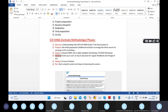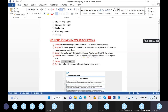Later the project will move to the Realize phase. The Realize phase is where we configure and test the project on a day-to-day basis for regular feedback. Finally, Deploy is where we concentrate on cutover activities, and go-live also happens in Deploy. Then Run is where SAP S4 is already live and we work with SAP S4.